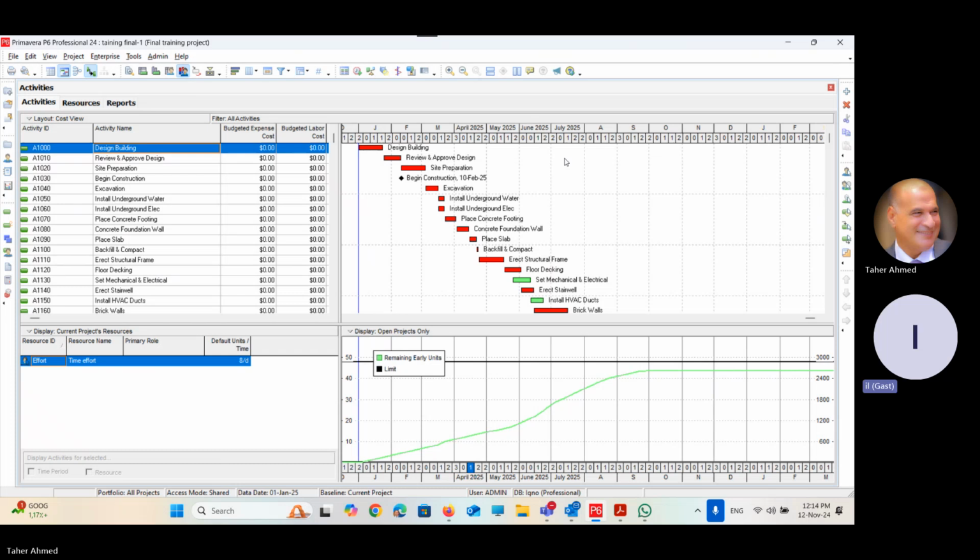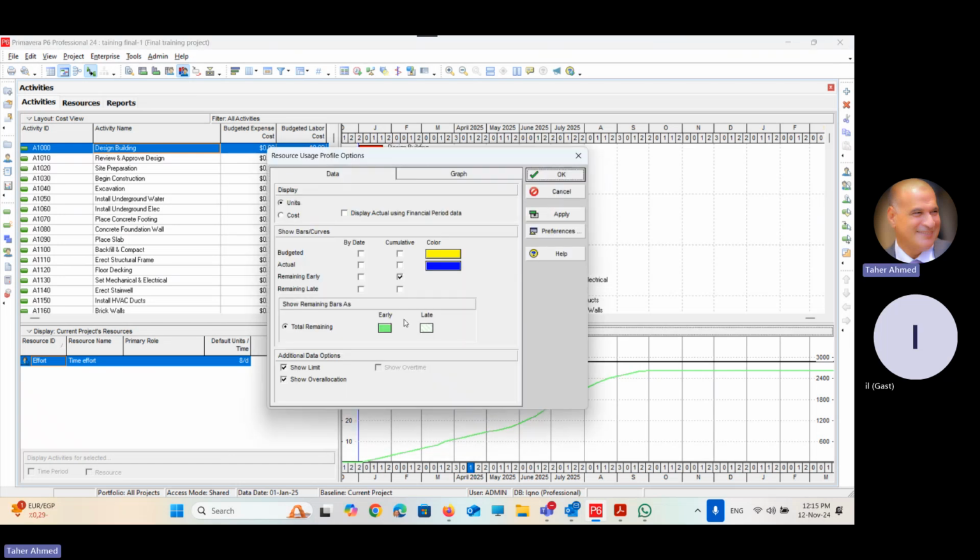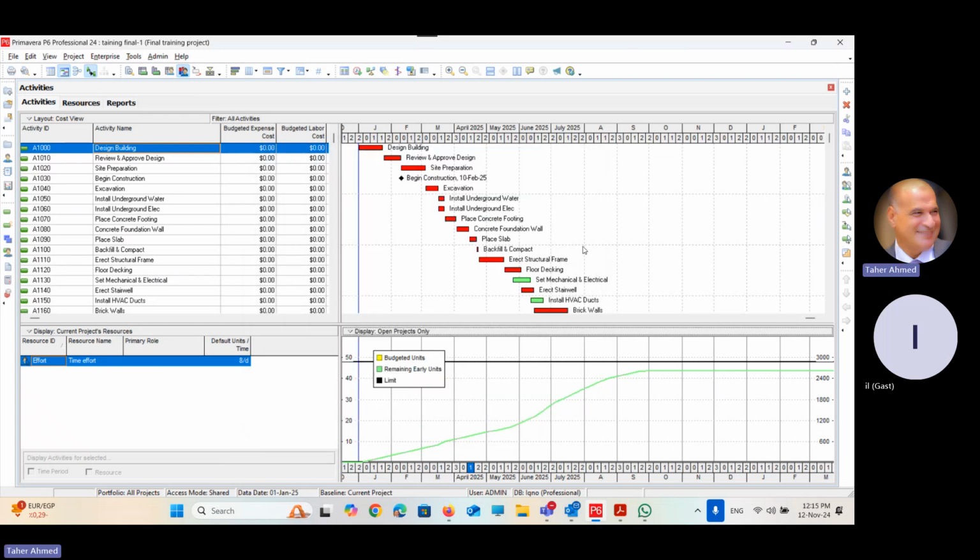Yeah, that's what I have seen in all the last. And if you want a comparison with a baseline, you can show both lines. If you have a baseline, all you have to do is choose the budget at the base. The budget will be represented by the baseline. So it shows the actual budget and the remaining. Okay, I think that's a good view to show that's our goal.